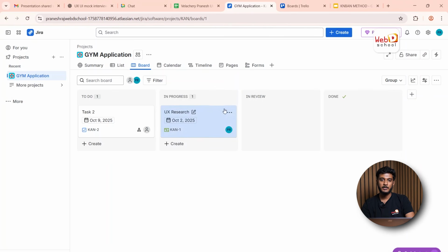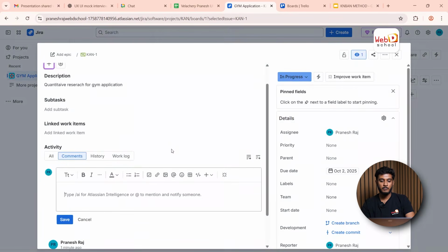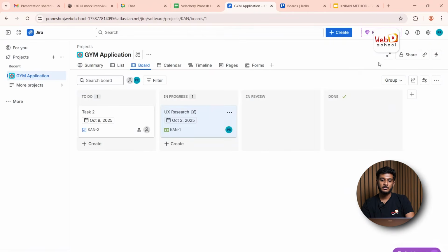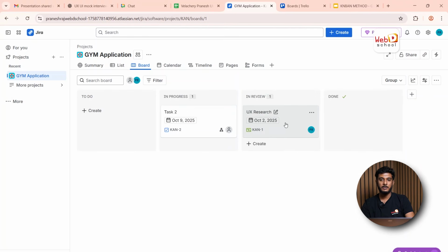They'll tell it in three different manners in industry, according to your company method. Once you do this, everyone on your team knows that you are working on it. So you are the main person, or in charge person, for this card to work on further, right? Like this, I'm working on this second card. Once the thing is completed from your view, you can move it to review. That means you are waiting for the client approval, or the test phase, or the UI designer team, or the developer team. So like that you can mention it in the review section.